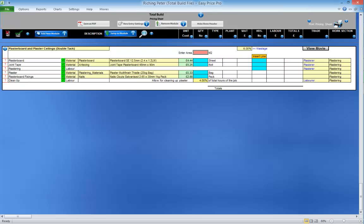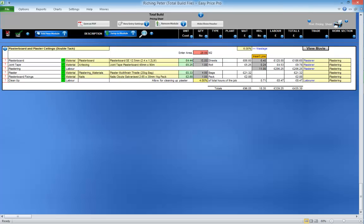At the top of every estimating module, you can see the wastage percentage that's going to be allowed on materials. It is in a yellow box so you can change the percentage if you want.